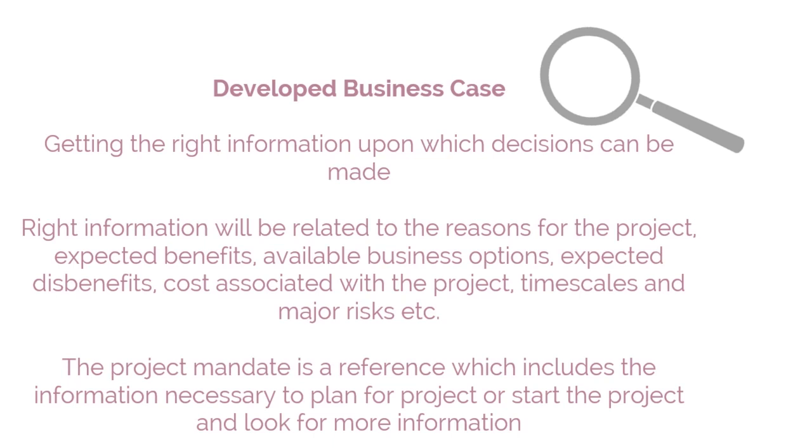The information for the detailed business case in initiating a project process will come from the outline business case, which is already developed in the starting up a project process, and the project plan, which would have been created in initiating a project process alongside the develop a business case. Also, the risk register, where the identified risks are documented. Before we proceed further, we should remember that the detailed business case is the outline business case updated with more information from the sources which we have just discussed.